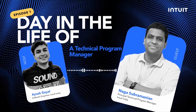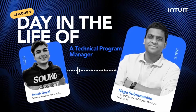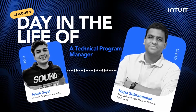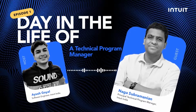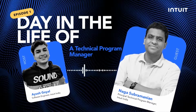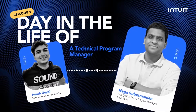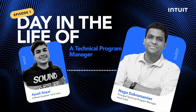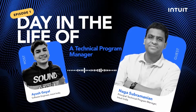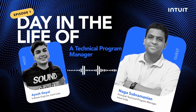It all depends on what sort of interaction it is and then how frequent it has to be. For example, there are some people whom I talk to almost on a daily basis. Some teams I will be in almost daily conversation during development time, but when I go to testing, it reduces to weekly or something like that. But the point is always having that sense of, okay, there is a dependency, and this is the state of dependency. This is how well managed it is, and depending on that, you decide.